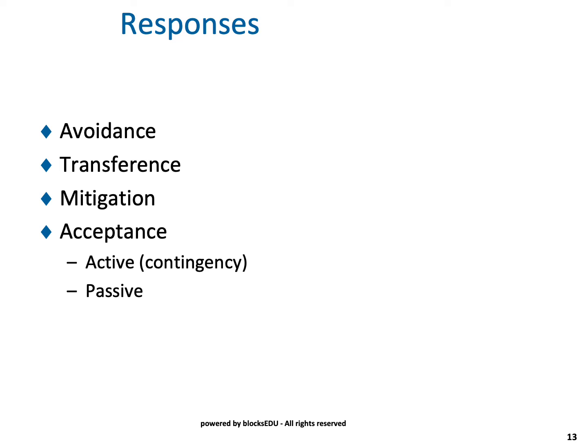An example of this, if you have something that requires specialized knowledge, but you don't actually have those skills in your area, what you do is you may hire a contractor to do that, and so therefore it's up to them to ensure that that task gets done correctly. Right? Now just remember one important thing: even though you transferred the risk over to the contractor, you're still responsible to make sure the contractor performs as per the contract.